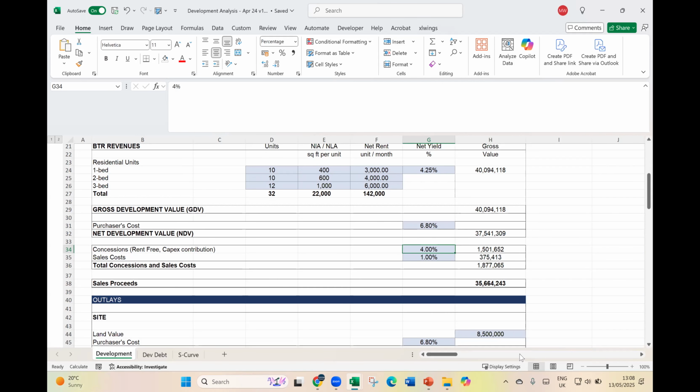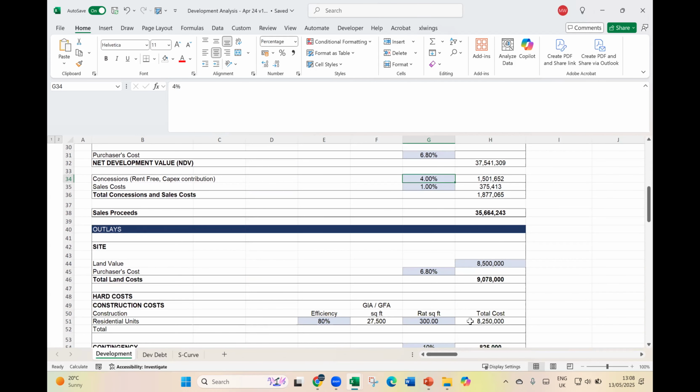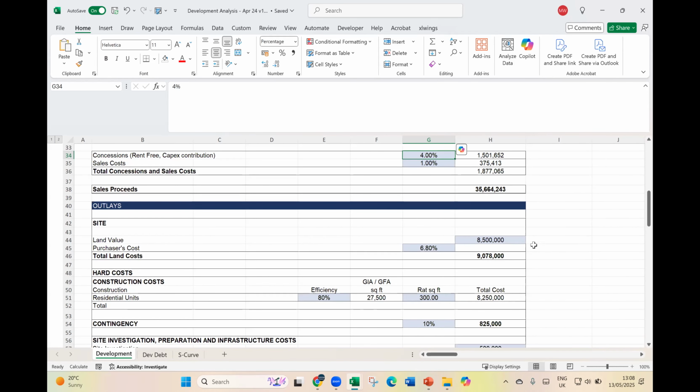Okay. The site value here. So this is assuming there is a site value. If not, then you can calculate your residual land value, either using Goal Seek or Solver, or you can keep trying manually for a long time as well.